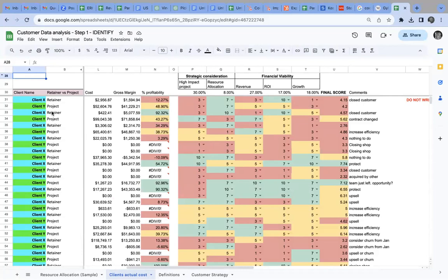So then the simple methodology is just to try to identify the revenue that you bill and the actual cost that you generate, both in terms of your own hours that you spend, subcontracting work you use, specific tools you might use, or any other financial item that you need to support the client with. Maybe you have some budget to do paid media, etc. All of that you incorporate into generating a profitability figure. And these are just dummy figures to highlight the costs, the revenue, the cost, and the gross margin in this model, giving you some indicative profitability.